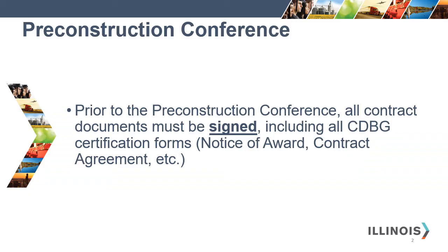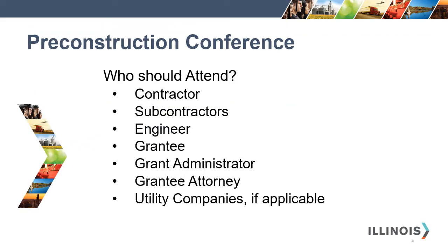Prior to the pre-construction conference, all documents must be signed, including the CDBG certification forms. Listed on your screen are examples of those who should attend the pre-construction conference. Absolutely, you should have the engineer, the grantee, contractors, subcontractors, and the grant administrator in attendance.